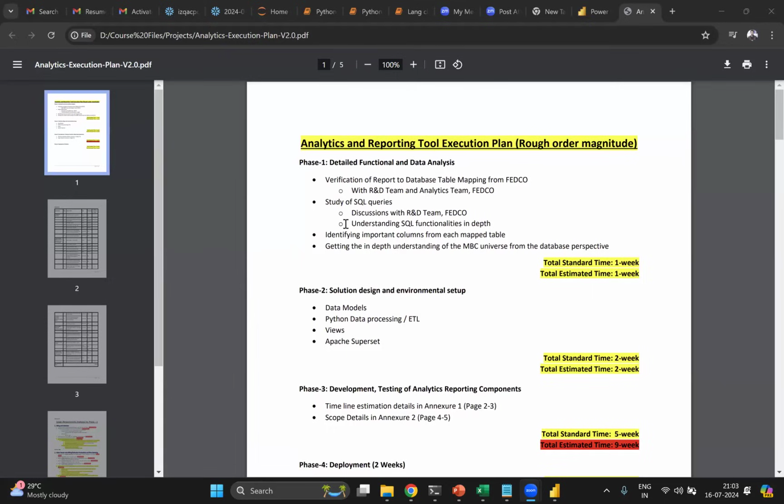When this planning comes is once the client is onboarded, once everything is finalized, once he is happy with our architectural diagrams and with how many days we need. And this is practical. It's a plan of action document. Before even designing this plan of action document, there is an initial 1 or 1.5 months spent sitting in meetings, gathering the requirements, creating the Figma diagrams, and verifying them.